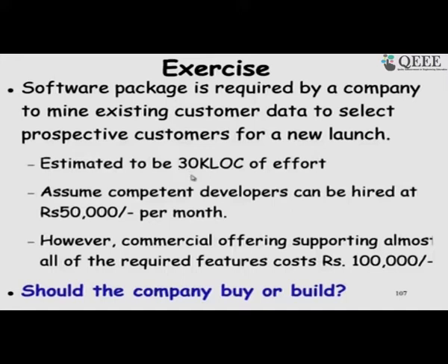So, that is the effort in person months, and each developer needs to be paid 50,000. So, 50,000 into 76 or 77 whatever comes out, that will be the cost, which is much more than 100,000.